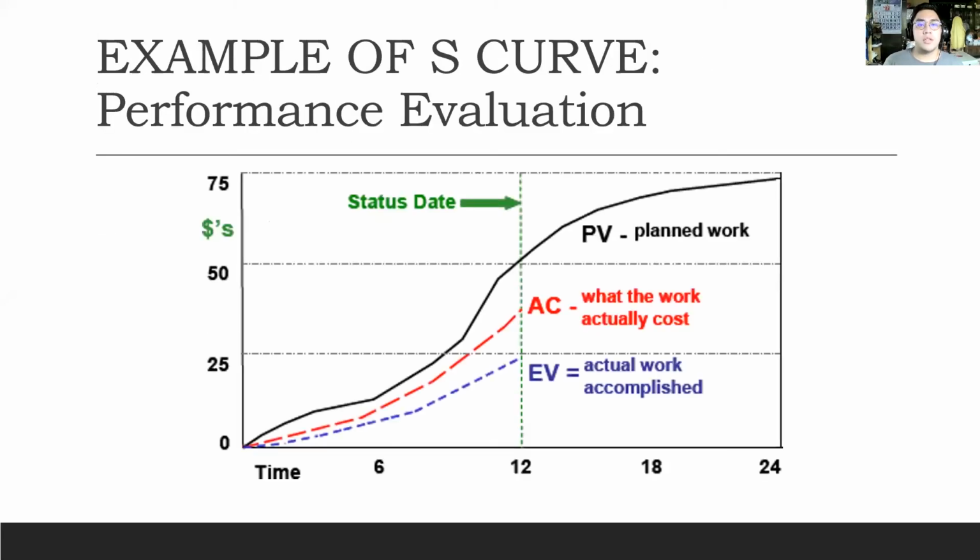For the example of our S-curves, it is for the performance evaluation. The first S-curve example we are going to look at is one of the most common and one of the most important. Using an S-curve for tracking general progress reports is extremely common in industries like construction. As you can see in the example, a company or project manager has mapped out the planned value, or expected progress, of the project from beginning to end. A project projection will typically take this form.